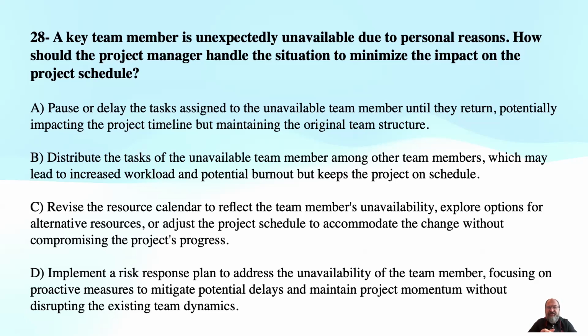Option delta is incorrect because bringing in a temporary replacement without evaluating how this addition might affect the existing team dynamics and project cohesion could disrupt the team's workflow and cohesion, potentially causing more harm than good.